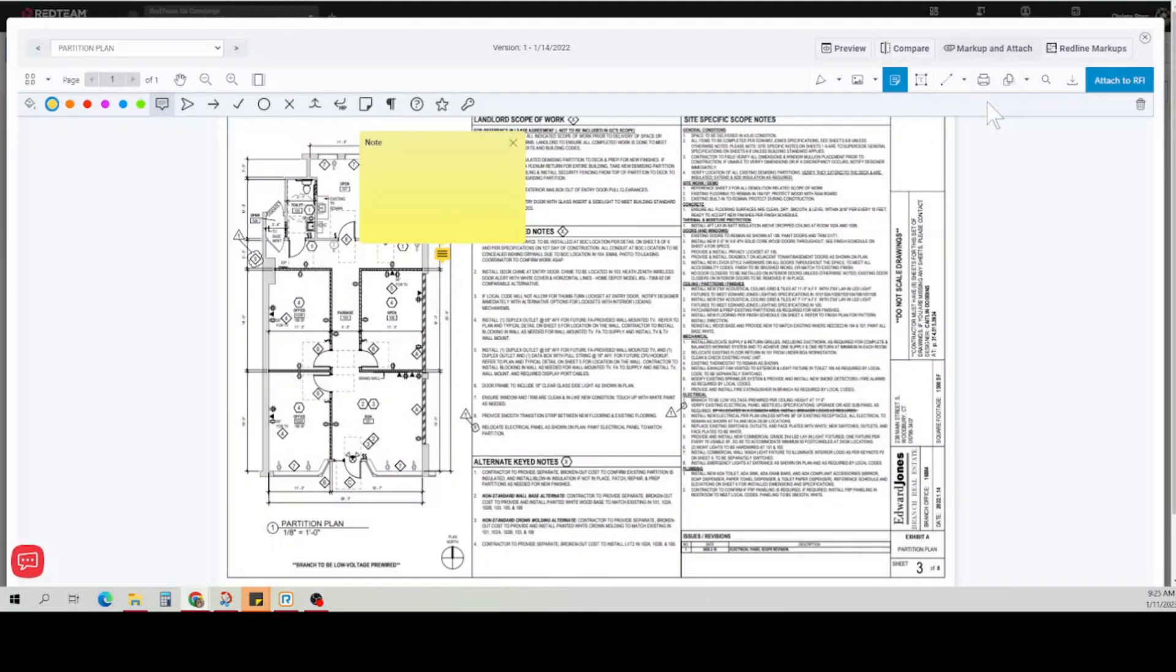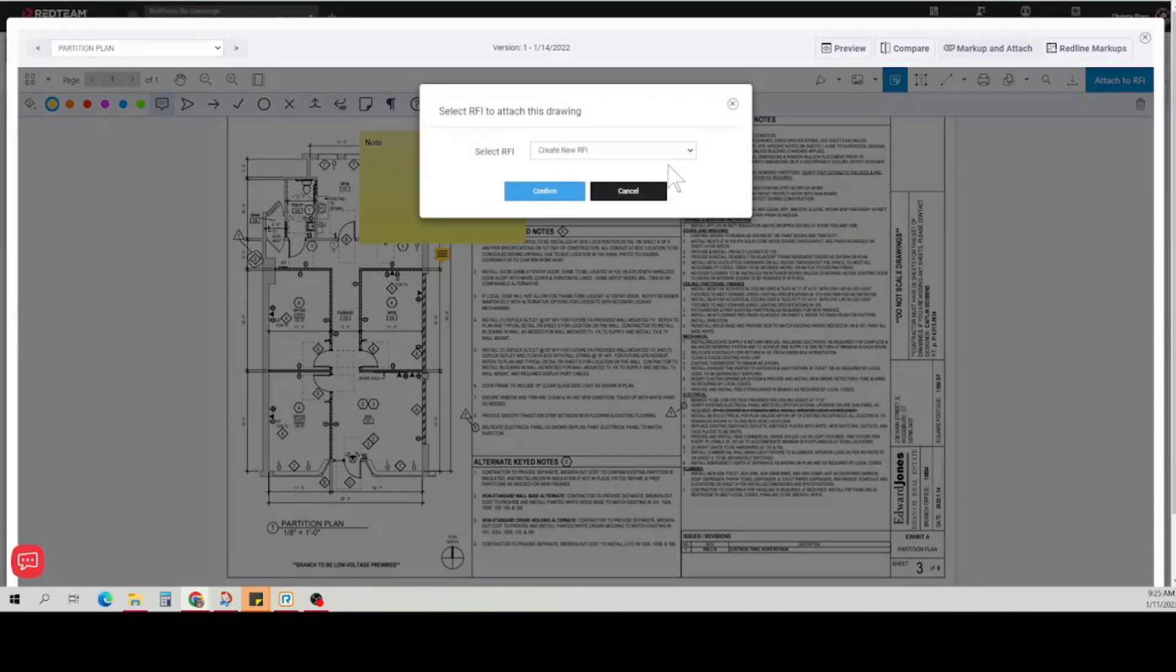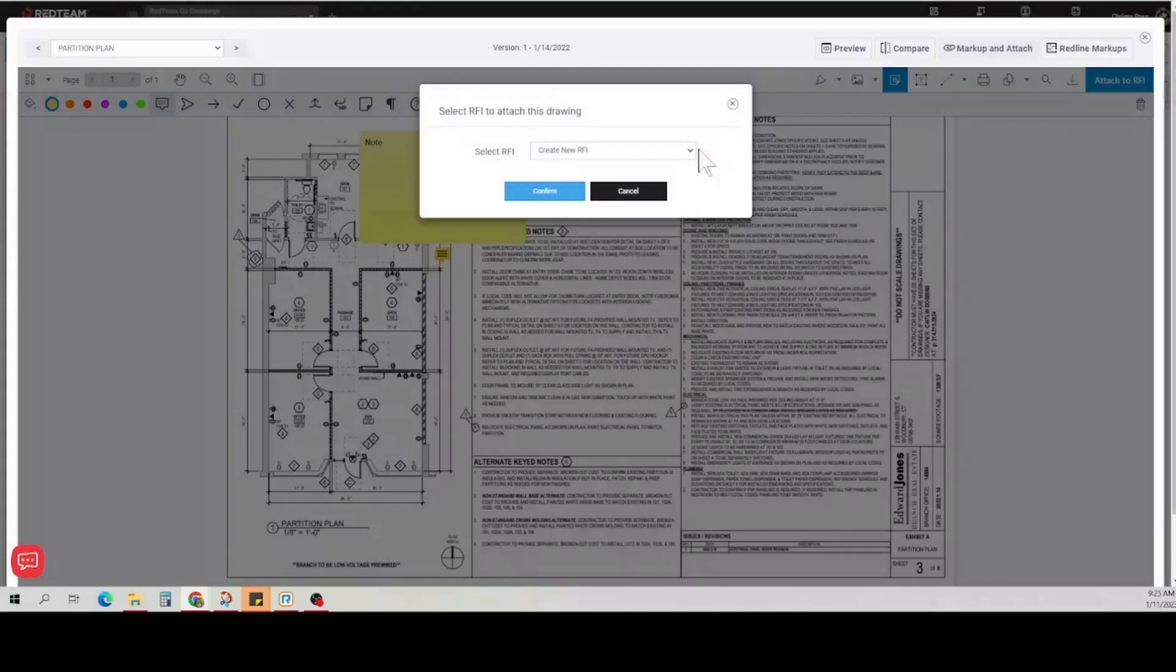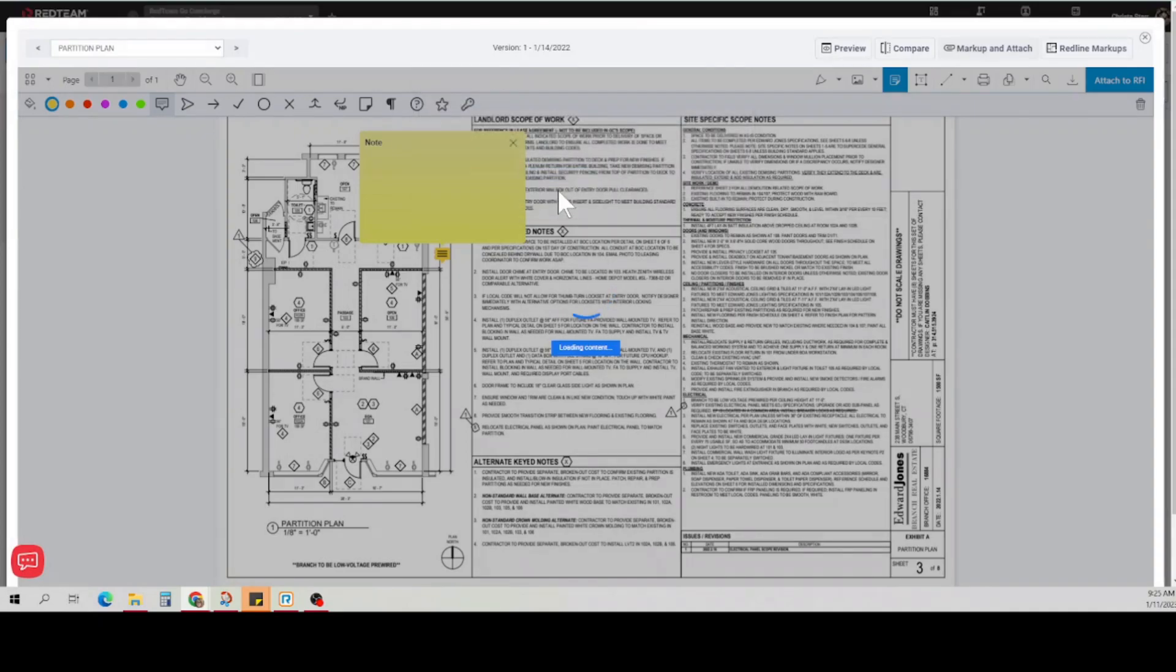Once you're happy with your markups, you can click attach to RFI. You will then be asked if you want to create a new RFI or connect it to another RFI. We're going to create a new RFI, so we're going to click confirm.